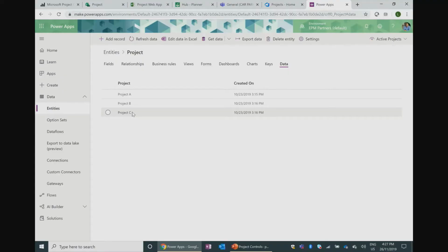So you say, because this project is at this stage of construction, I don't want the milestones to be updated by the designers using their Excel sheet or Microsoft Project. I want them updated by the P6 file that the contractor maintains. So even the project itself, we can connect to different applications, depending on what phase the project is at. Does that make sense? At the beginning, we'll get the main milestones from an Excel file, but once the contract is awarded and there's a sophisticated P6 schedule behind it, P6 will update it for us, but maintained here, on one common platform.